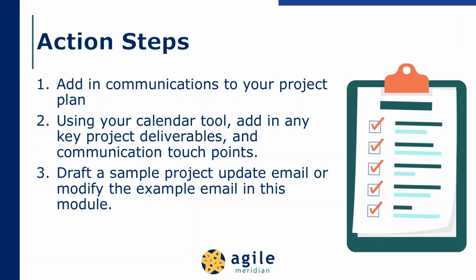Action steps. Using your project plan, add in communications using your tool of choice or the template provided. Be sure to include the following for communication. What frequency will you use to track your project? Weekly, bi-weekly? What frequency will you communicate to your project sponsor? Weekly, bi-weekly?